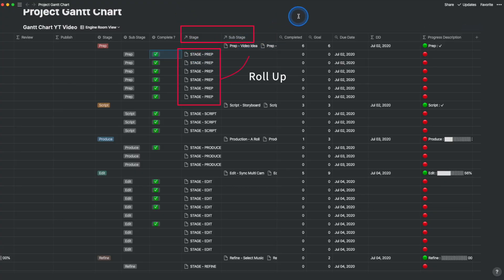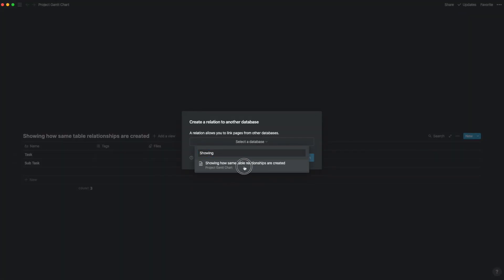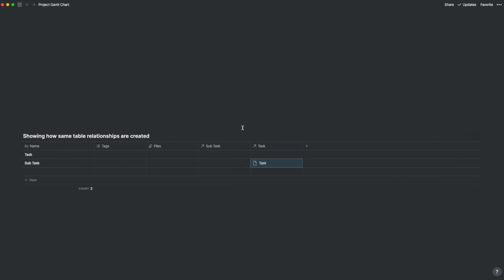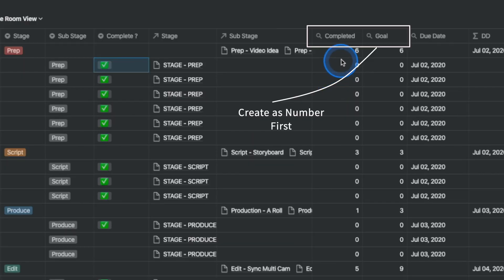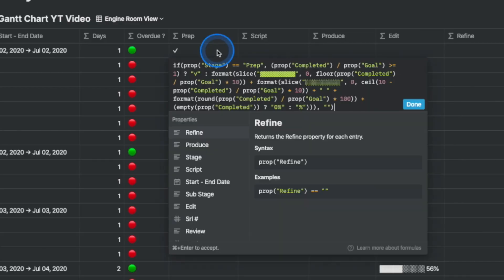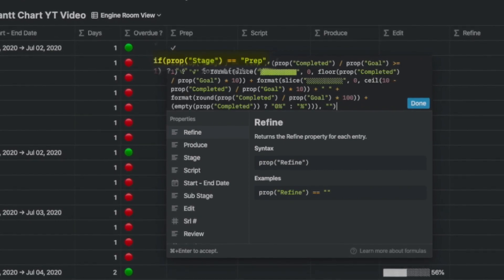Then I used a relation property and rolled up the activities into the main tasks as a self-referencing table. This is the same relation property across tables, but you select the same database table and choose the first option to create the reference. Now you can create two fields — the completed and the goal column — which are pretty standard for creating the progress bar. Both are number properties. There is only one small change to the formula: an if condition to display the content in that column if the stage is the same as the column name.